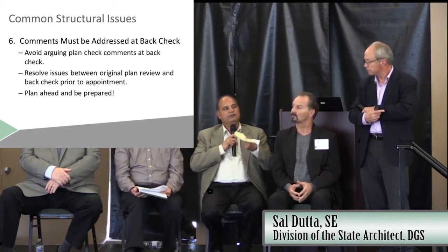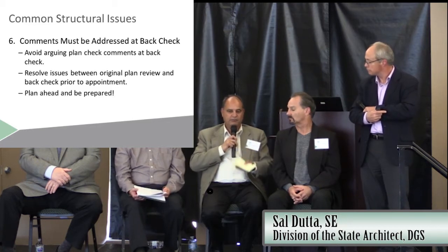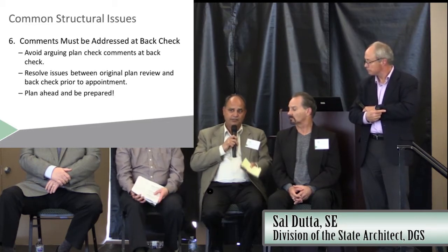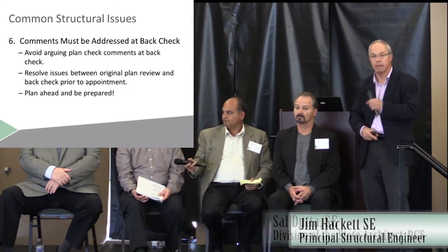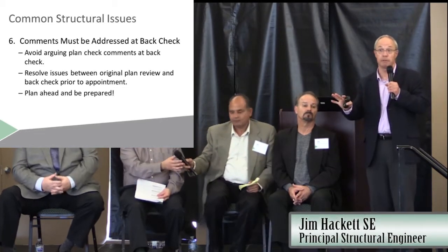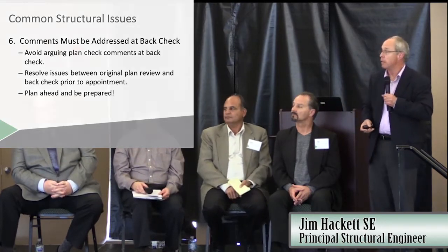We want you to look at your plan check comments and resolve the majority of them as much as you can before the back check date, so we don't spend more than a day or two doing the back check on larger projects. And don't forget, if you really run into a toughie, contact the supervisor right away and don't waste time.